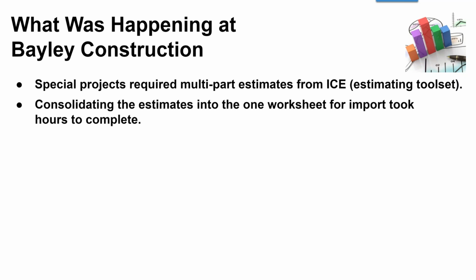All right, so they were actually doing this manually, and it took several hours on every project to actually do this conversion. And it also required some pretty extensive expertise as to how to actually look at the estimate and then convert it into the element that they needed. And through that process, they were actually manually changing the data. They were moving it from one Excel workbook to another Excel workbook, and so manually adjusting data in that sense.